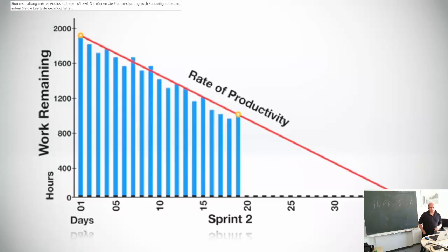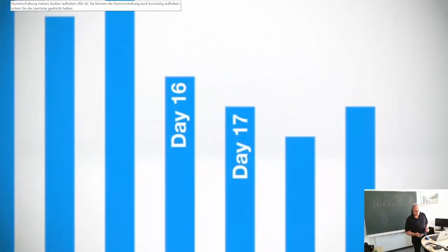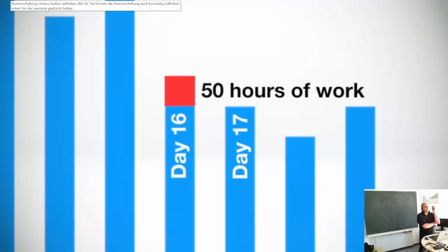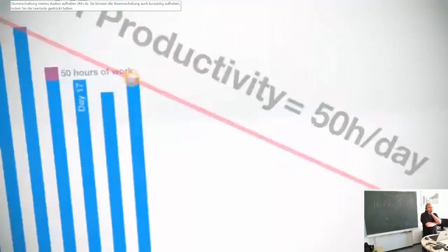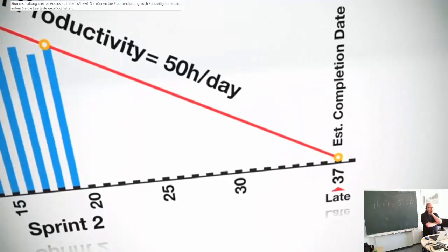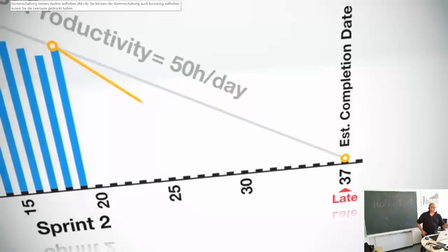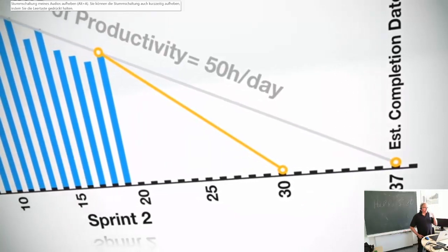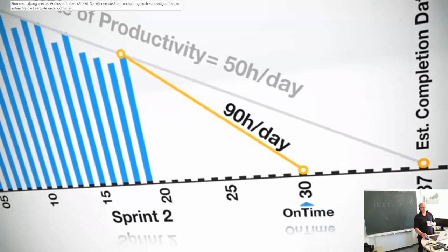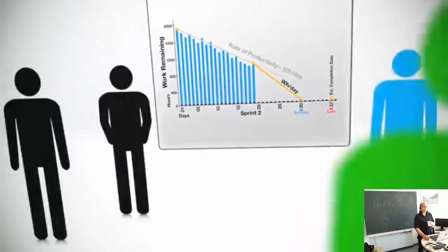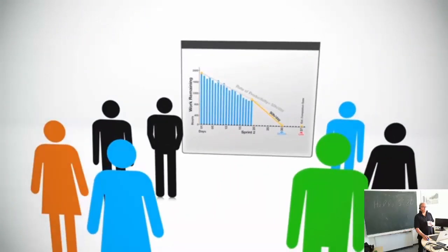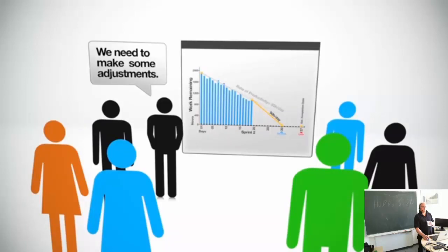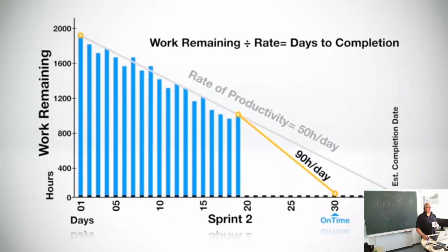The burndown velocity is the average rate of productivity for each day. For example, a team's rate of productivity might be that on a typical day they finish approximately 50 hours of work. Knowing that, it's possible to calculate an estimated completion date for the sprint, or even for the entire release. What's great about the burndown chart is that we can compare our actual velocity and projected completion date to what the team needs to do in order to finish on time. Knowing whether or not the project is on track early in the schedule can help teams make the proper adjustments necessary, providing empirical proof that the project is on track — or if it's going to be late.